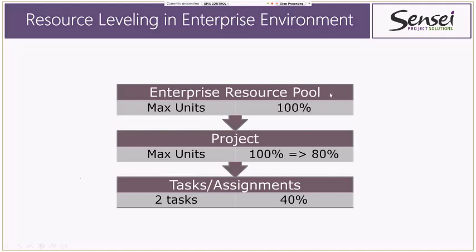If a resource, let's say Johnny again, is available to do project work at 100%, you may only get an 80%, 75%, or 25% allocation of that resource's time. Let's say that on your project, you get 80%. So now we have to go in and make that adjustment in the max units column, and then we can split the assignments if we want that person to work on multiple assignments, split them 40-40, for example.